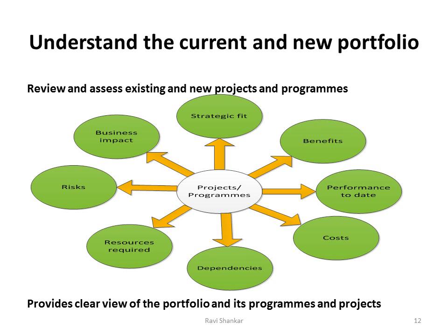If there is a given project or a new idea, you have to look at n number of things, like the strategic fit. What benefits is it going to raise? What's the performance to date to the organization? How much does it cost? It can be operational or capital budget. What are the dependencies?